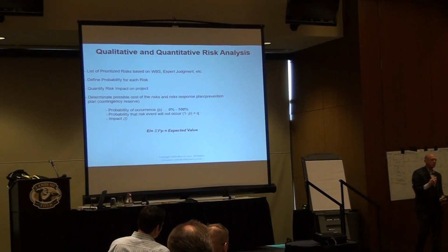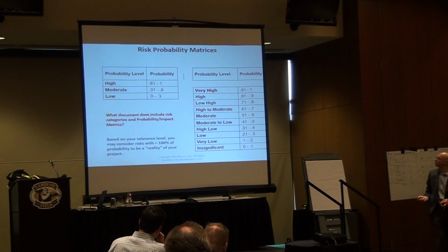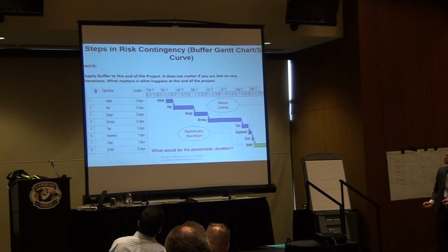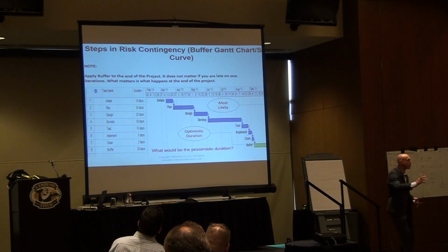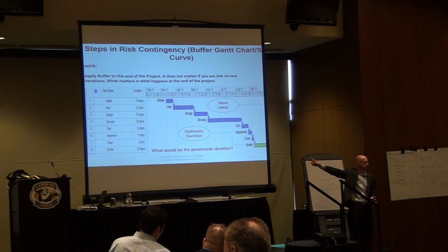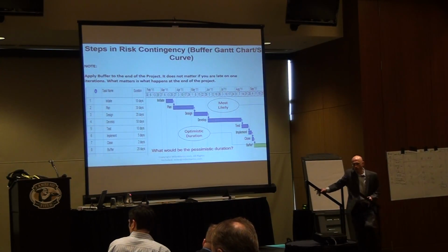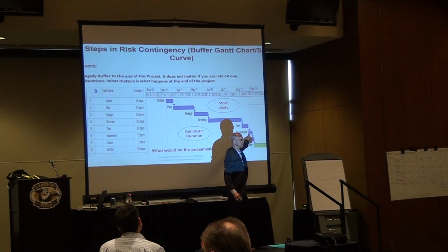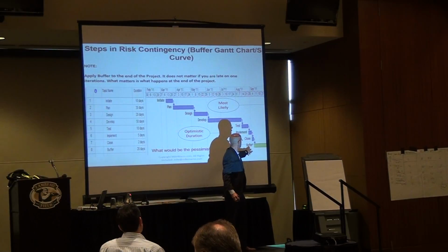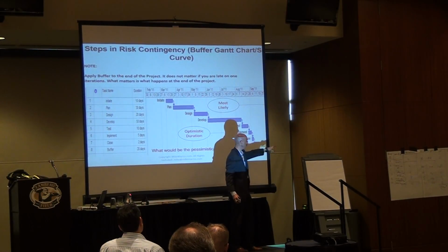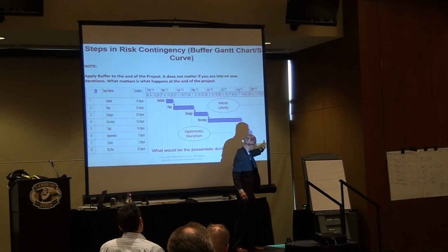And what I do with it, once I calculate this expected value, assuming they are all on a critical path, I would just plug them at the end of the timeline. And I would say, if my team estimates the new project at this point, this would be the most likely duration. That means optimistic plus contingency is the most likely duration of the project.